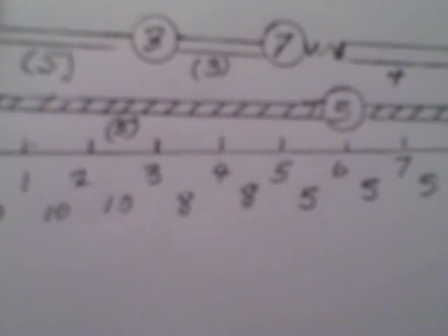And then my resources will look like this. It'll start out with 10, 10, 10, 8, then drops down to 5, 5, 5, then 1 through the rest of the project. So I have eliminated that one little peak from that 1 day in the earlier diagram, which I showed you before, where it went up to 9 workers. That's the simple idea. It's really not a complicated thing.